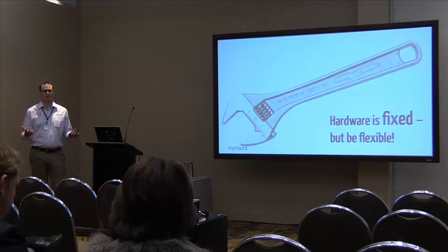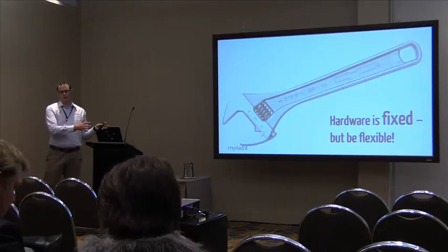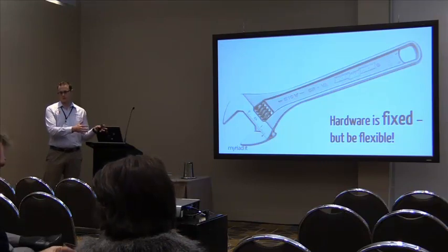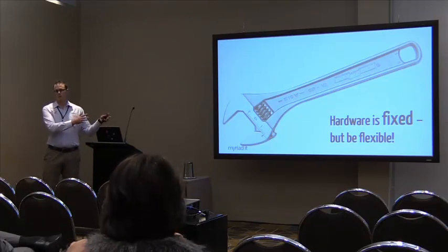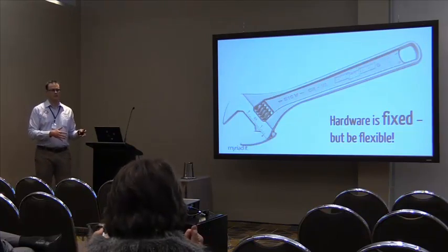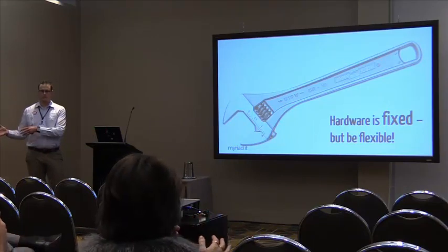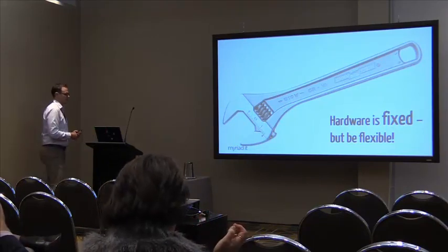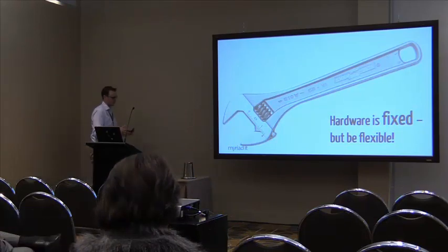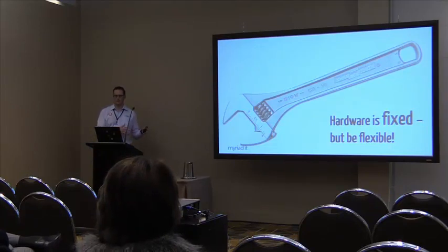So then you can think of cloud options. You're only going to need these environments for a couple of months, so why go and buy when you can rent? You have them for the period of the upgrade, then you can give them back, so you're not having to worry about those sorts of costs. It can also be a fixed cost, because you know that for 3 months it's going to cost you this much to rent, so you can put that into your upgrade costing.